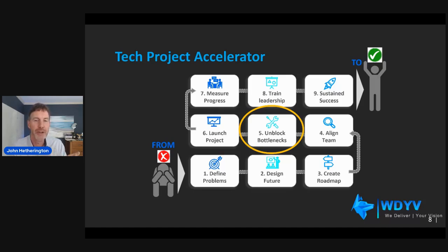And then the last point here is around we talked about standard operating procedures, checklists. So for any project, make sure you have an onboarding checklist or toolkit. So when someone comes into the project new, here's the charter, here's the goals of the project, here's the organization design, the organization chart showing who's who with names as well as roles.